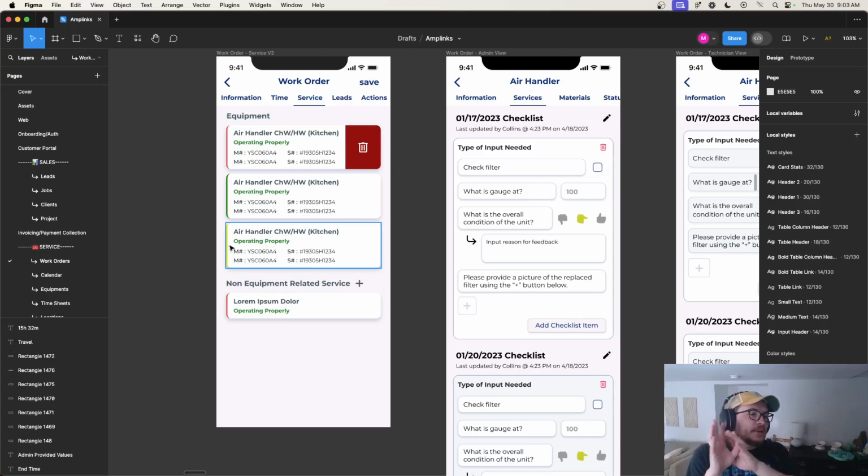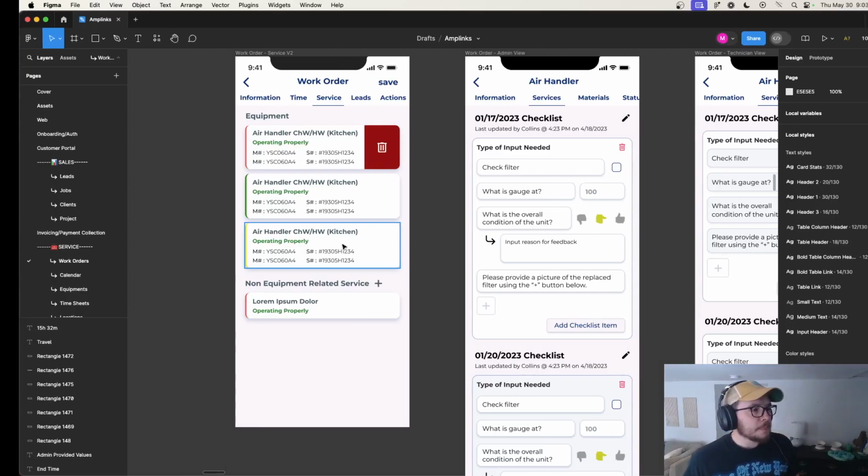We convert that job to a project, which now has budgets for labor and different materials, and what we're calling task codes, which are essentially different types of budgets. Then we can create service calls, work orders for that project, sending out technicians, and tracking the costs and seeing how much budget we have left, right? So that's the whole flow of things. Where was I going with that?